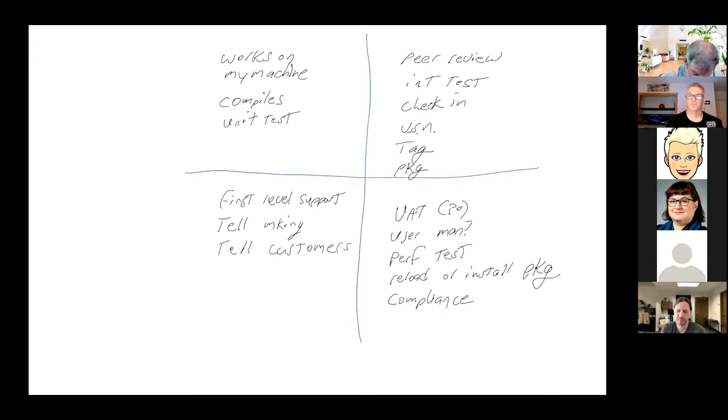Currently, your definition of done should be tactical at the PBI level. So it should apply to every product backlog item. And I'm not going to ask you any more questions for a while, Jim. Thanks. And strategic at all levels.